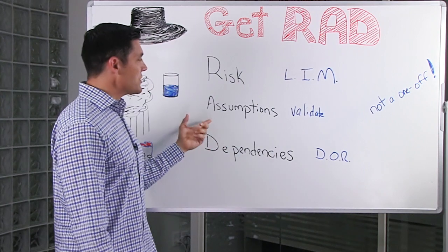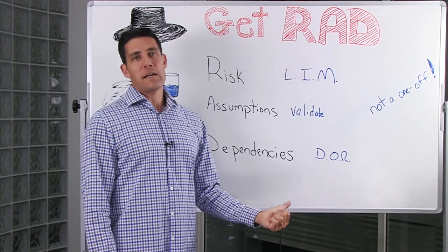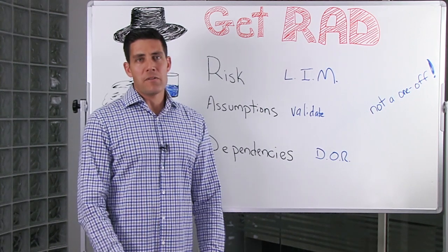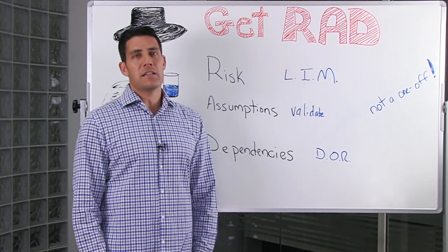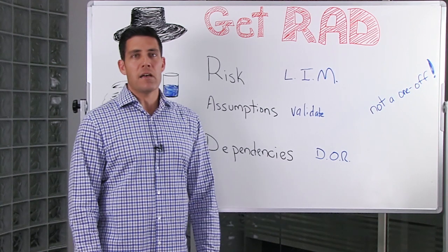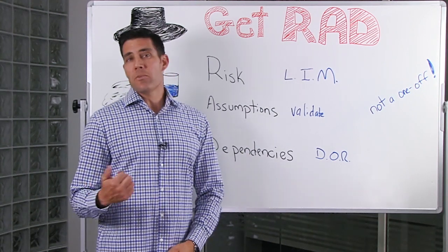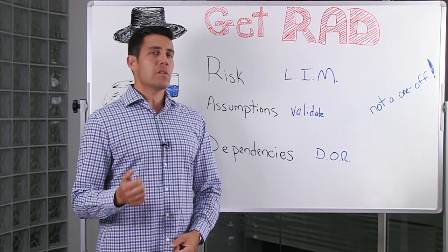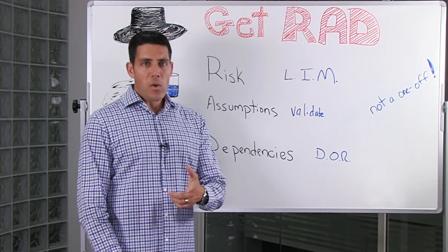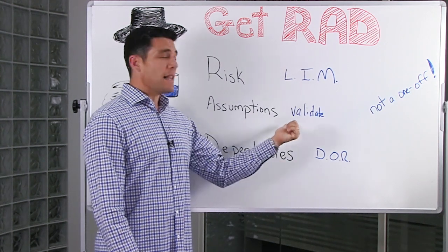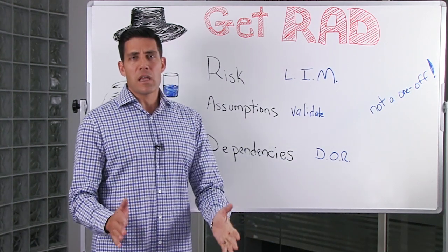Assumptions. How often do I see a list of assumptions in a statement of work or project charter that have not been validated? An invalidated assumption is a worthless assumption to have. When you list an assumption about your project, about your stakeholder, maybe your end users, you need to make sure that that assumption is validated. Go ask the end users about that particular item and make sure that they validate what your assumption is on that item. I'll give you an example.